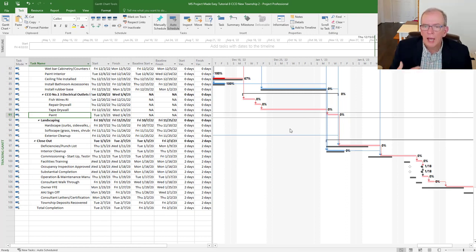We could look at how we want to schedule our time. And if that means the painter says that's going to be double time, if I'm coming during that week, that's going to cost X, Y, Z, then you could price your contemplated change order accordingly. The other thing you could do is say that the project's going to take longer.